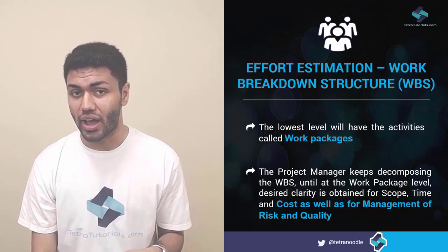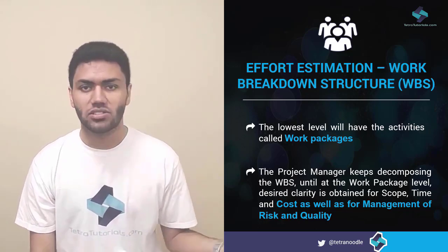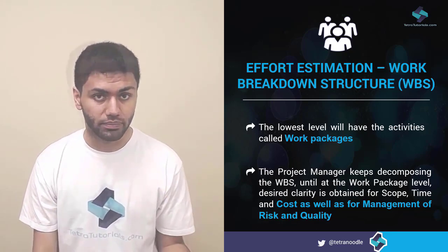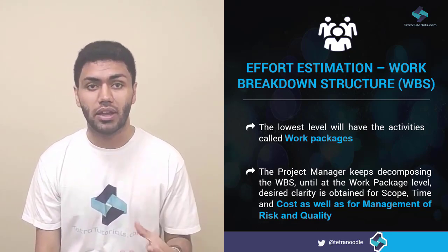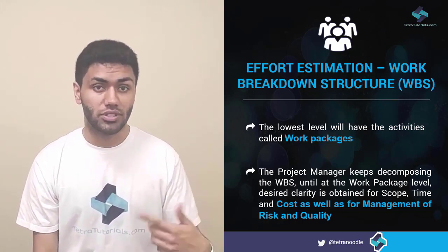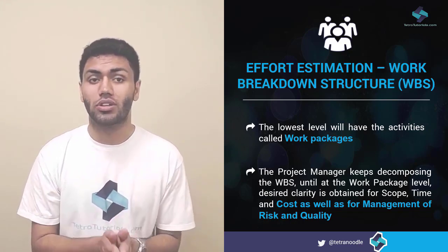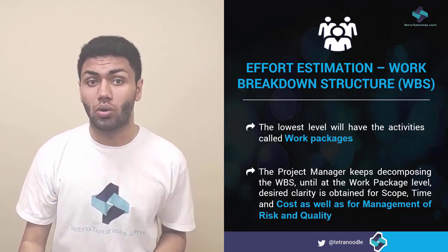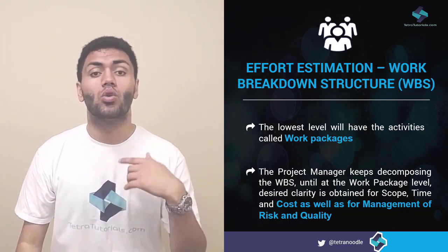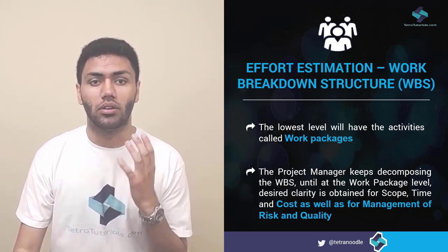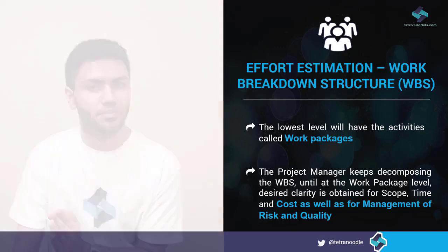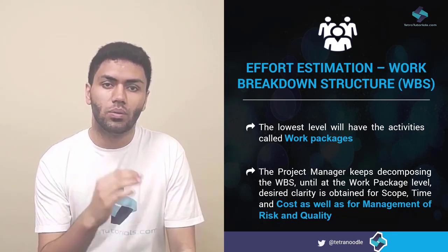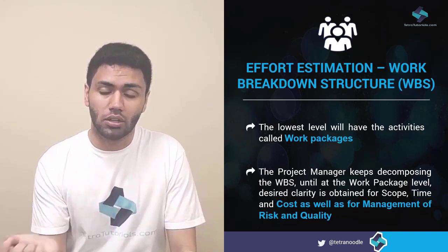Estimations are not usually very accurate because you may need to make many assumptions wherever the activities or the requirements are not very clear. However, the decisions are made based on these assumptions so that we can proceed with the project. It's extremely important to document these assumptions so that when these assumptions change or they no longer hold true during the project, you can re-estimate the tasks based on the change in assumptions. Assumptions make the project teams go ahead with the decisions and not get blocked by some unknowns.